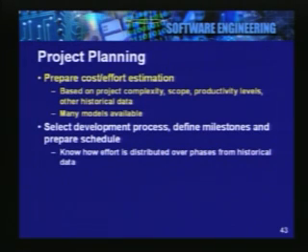We had seen one graph where we had shown the relative effort distribution over different steps in a typical waterfall kind of methodology. We should have our own data from past experiences so that the overall effort estimated by us can be distributed over these different steps, and we can prepare a detailed schedule for execution of the project.